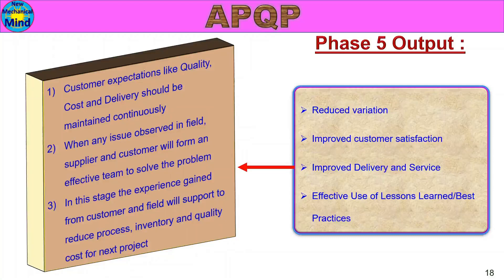Improved Delivery and Service: customer expectations like quality, cost, and delivery should be maintained continuously. When any issue is observed in the field, supplier and customer will form an effective team to solve the problem. The experience gained from customer and field will support reducing process, inventory, and quality cost for the next project. We will be able to improve on-time delivery and solve field problems. After sales, if the product has a defect, that is a warranty complaint, and the customer will be able to resolve it.